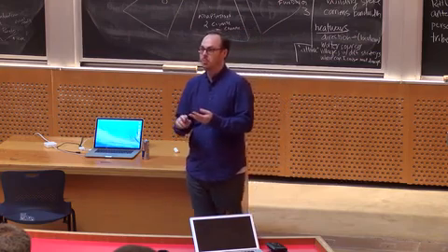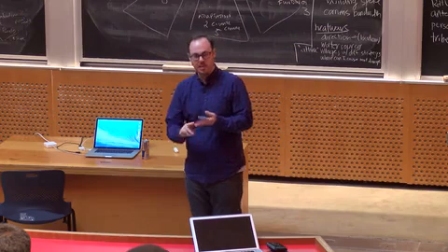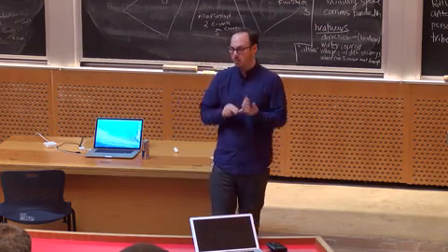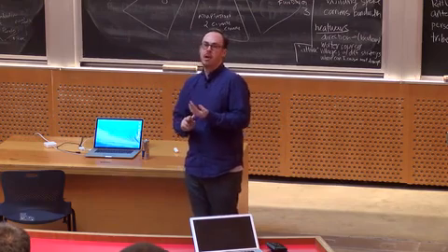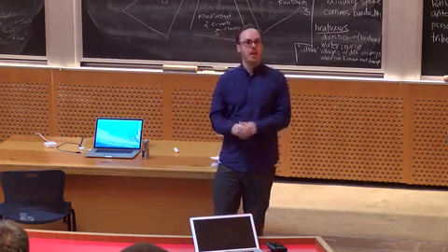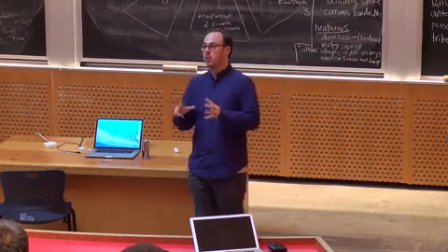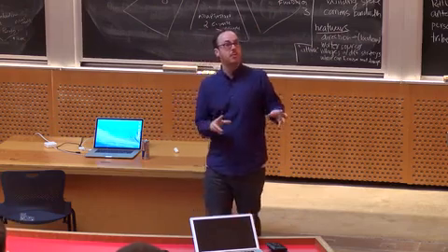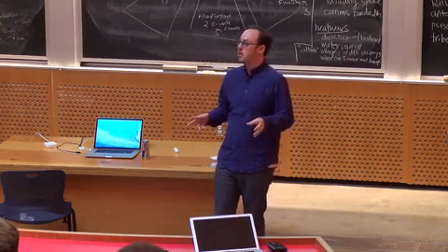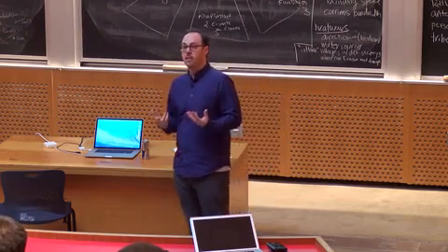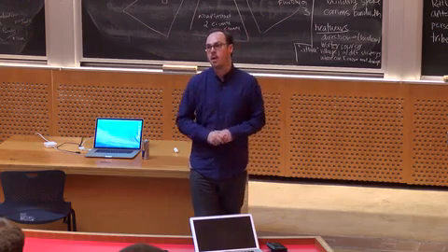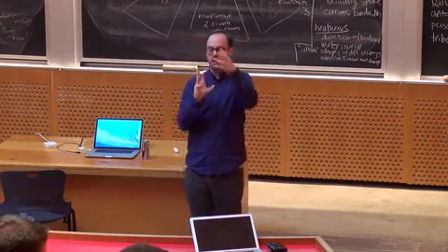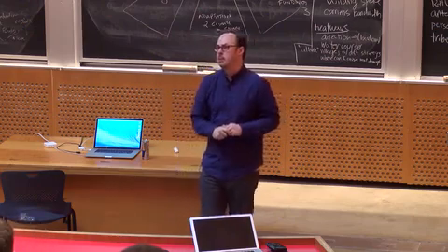Communication largely, scheduling largely. The one thing they didn't have that I think you're more prepared to do if you were in a big team like that is they didn't understand how to break out into strike groups, into strike teams, how to separate tasks and form into smaller groups. I've actually seen you all do this on these previous 2 projects. So if you do find yourself in a large team, think about how you're going to break the work up into these small tasks, into these bigger modular kind of things.